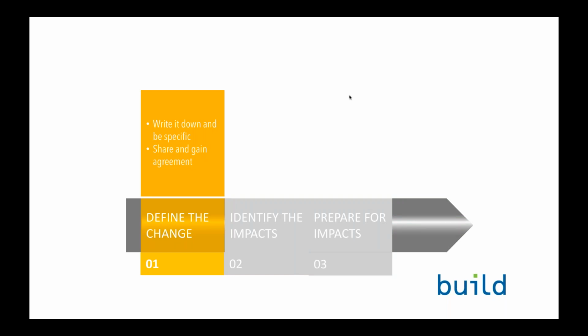We see so often working with our clients, people have plowed ahead with a change and aren't really even clear on all the components of that change. So our advice to you, in defining the change, is to write it down and be specific as you can, share it with stakeholders and leaders, revise it, share it again, and ultimately get to final agreement.